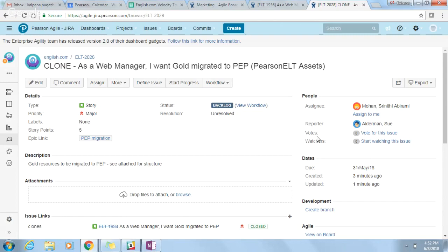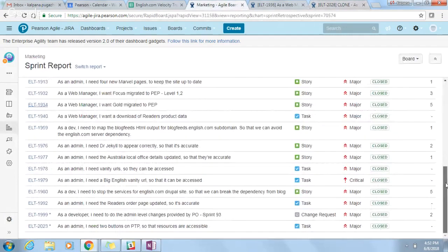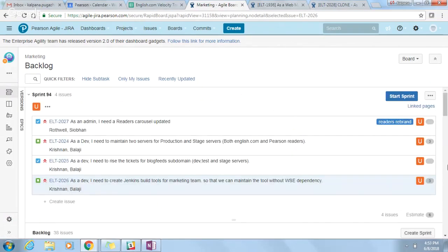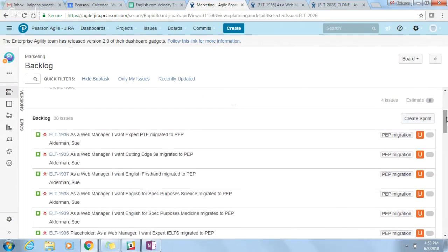Just in this sprint, I'd like you to figure out how many of the ready products you could pull into the sprint, in terms of how much velocity you have. And I guess for all of them, you know roughly how many assets are involved because you've done that work on the spreadsheet. For now, I'd place them in order of priority as well, so just pull in however many you think you can fit in.